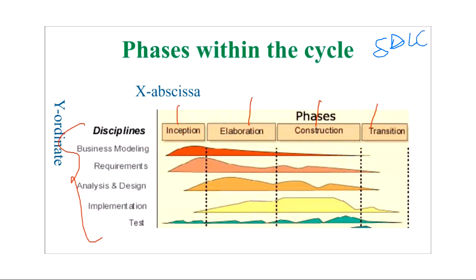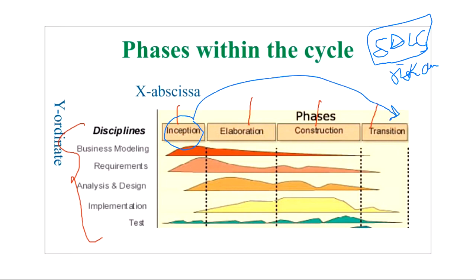because you have to do the risk analysis, right? Risk analysis is a very important word in software development. If you have been given a project and you start from the inception phase and go to the deployment or the transition phase at last, and you didn't perform risk analysis even once, and you think that at last, after the construction part is done, in the testing part only I will do the risk analysis, then definitely there is a very high chance that your project will fail. You have to perform risk analysis and testing in all these phases. Do it just a little at a time, but you have to perform risk analysis and testing in all these phases,